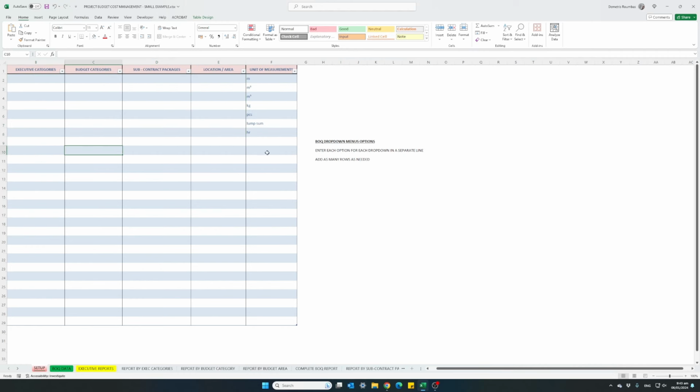Now, as the project starts, we will start preparing agreements and subcontracts for our floor tiles installation. The quantities most usually will be the same at this point, and we managed to agree on a lower price with the contractor. Instead of 12 euro per square meter, we managed to drop the price to 10 euro per square meter. So our contract total for this line of work is now 4,900 euro.